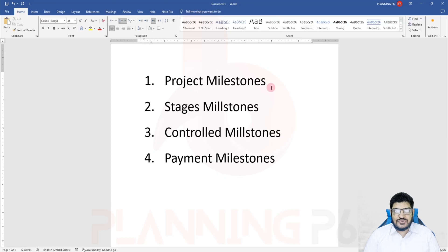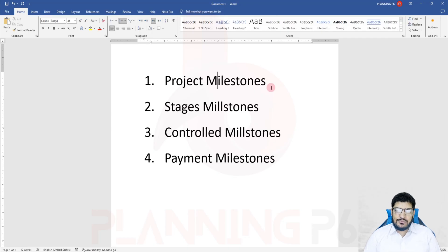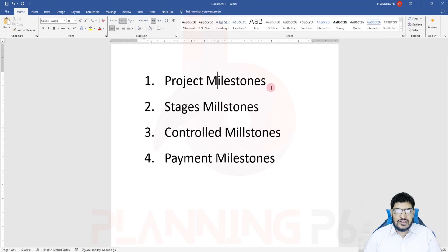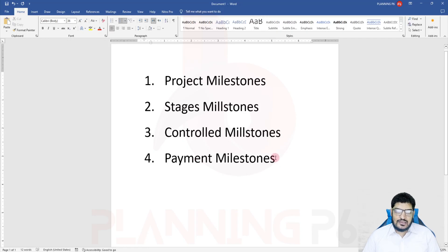For specific projects, the stages could be mobilization, engineering and procurement, then construction, and then demobilization or commissioning — the start and finish of those are the stage milestones. The controlled milestone is a project management term used for specific activities — for example, monitoring hydro testing, specific drying, specific line, or specific concrete foundation pouring. On client requirement you also add payment milestones — for example, 50% or 20% after mobilization completion.